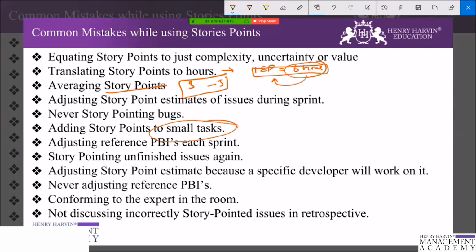So every now and then the team story points an issue where it is clear that the estimate was completely off. So it is important to discuss these issues and try to learn so future estimates are more accurate. In one of my teams, we forgot to take into account the creation of test data when estimating. So we made it a special point to discuss for each issue if creation of test data was applicable. When applicable, we would ask if they took creation of test data into account. This actually improved our estimation a lot.